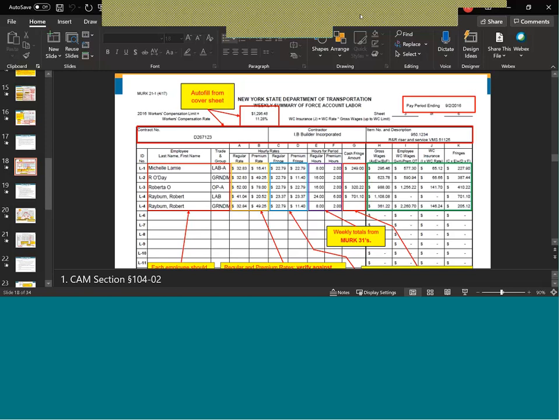And think about also, if they're on overtime at the end of the week doing force account work where they've done contract work all week, again, we have to eat that. It's whatever the certified payroll is showing. So they're going to get a little bit of a freebie from us if they have somebody working excessive workers' comp hours.